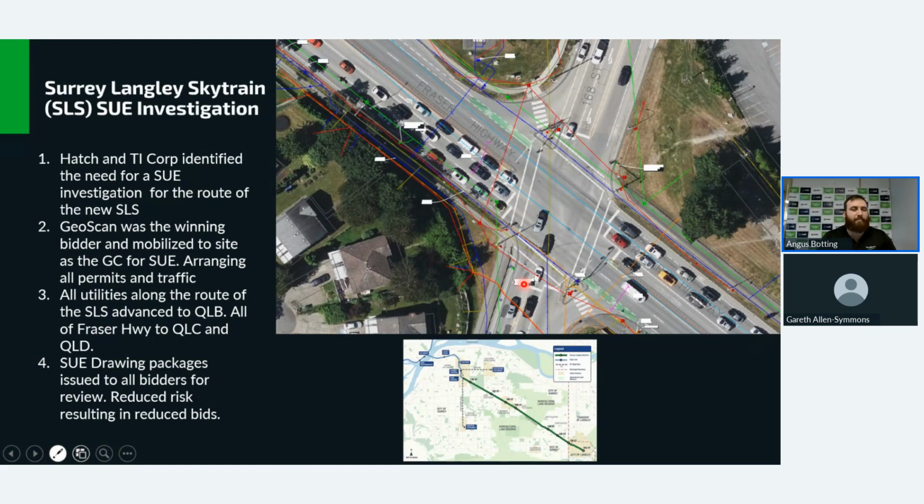The main aim when it becomes a design-build is, it's the same as giving them more geotechnical information, you're allowing your bidders to have the most possible information to then, as everyone calls it, sharpen the pencils of their bids. So they don't have to account for unknowns when they already have the investigation. This project's been running for a few months now. We're hoping to finalize the product in the next few weeks, for anyone that's working for TI on the webinar.